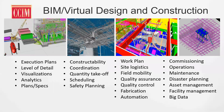In virtual design, they're coming up with all sorts of different ways to utilize these models — how can we communicate better. An execution plan is one approach: they can break the building down into bite-sized chunks of what they're going to execute today, tomorrow, for the next three weeks, and do a much better step-by-step walkthrough of the construction planning and constructability. They can change the level of detail inside these drawings depending on who the audience is — communicating the big vision to the owner, but also communicating to the pipe fitter or framer exactly what he has to do detail-wise. That really helps in the visualization.